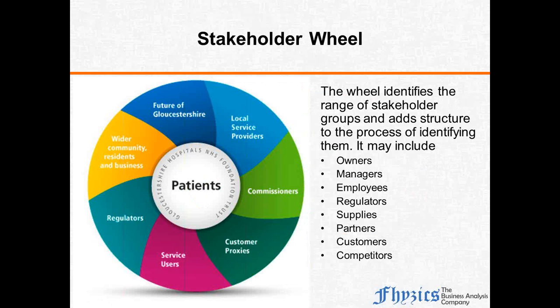When a requirement is identified correctly in the first place, that is the most cost-effective business analysis project or project altogether. But if a requirement is incorrect, and it is found to be incorrect at a later stage, the more time it takes, the costlier it becomes to correct it, right?